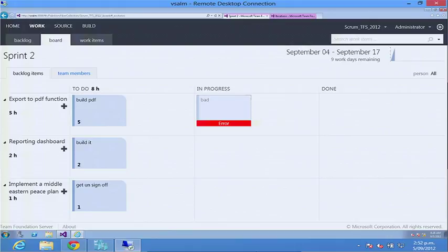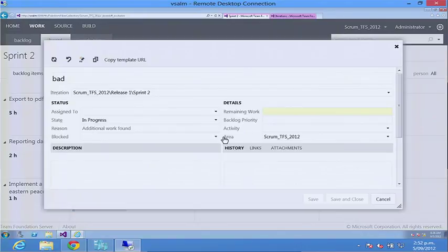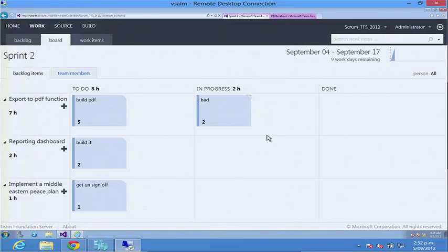Right, I think you got it. Yep, you need to update the time. I'll leave it up here, come get it at the end. Because the work remaining is 0, right? So how can we have something that's in progress with no work remaining? So if we go in here and say, yep, now it's happy.